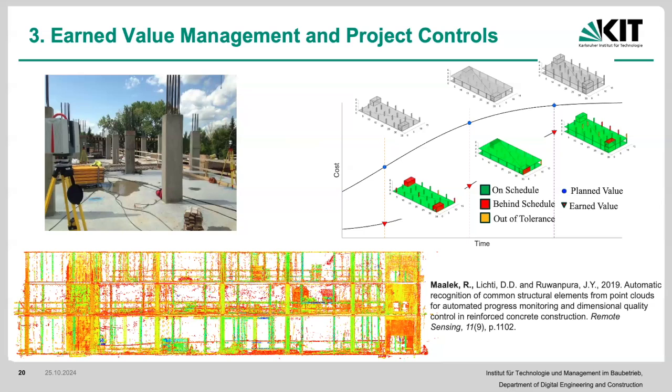Are you guys familiar with earned value analysis? Have you, no, you haven't heard of it in your undergrads? We're going to talk about this briefly as well. Essentially, it gives you an earned value in terms of units of cost versus your planned value, which was what was planned based on what was expected to be completed versus what has actually been completed. It's a very popular project controls method because it just gives you a bunch of numbers and gives you the schedule slippages and various different aspects there as well.